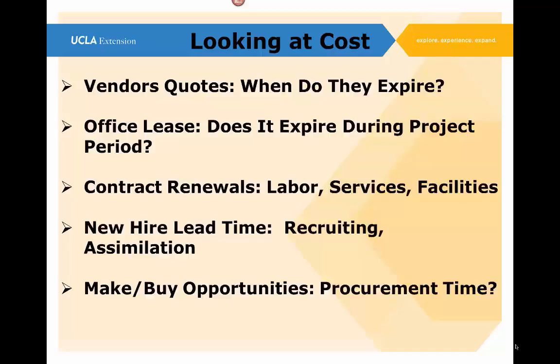Well, that's not true. When a new person comes on board, whether they're from inside the company or somebody else, it takes time. They got to find out what is the job they're supposed to do, who are they supposed to work with, who is going to lead them or work with them or support them. What about taking a look at the project plan? How about giving them some kind of briefing on and introducing them to the team members and to the project and all that? That takes time. You get a new person on board, I would think that they're not really truly beginning to get productive for at least 2-3 days. And I think I'm being very much of an optimist when I say that.